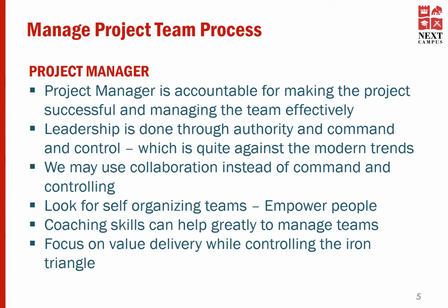Expert and reward are best form of power. And penalty is the worst choice because you penalize your project team members. And this can cause demotivation in your project team. Formal, reward, and penalty powers are derived from project manager's position in the company. But expert power is earned on your own because expert power was coming from the knowledge of project management or a technical knowledge in a specific area. And this is earned by getting experience in specific areas.